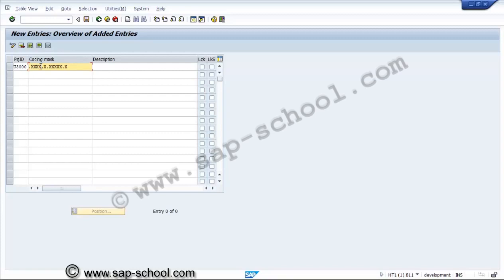And in the second level, we are giving a single character. We can consider this for sizing of the project so that we can easily identify the list of projects that fall under medium category or a small category or a large category.